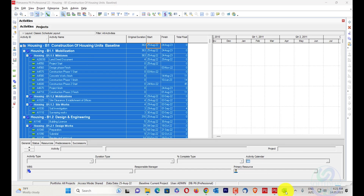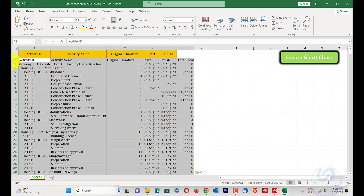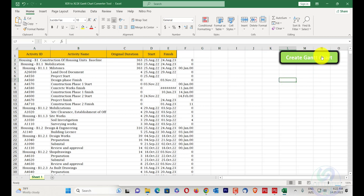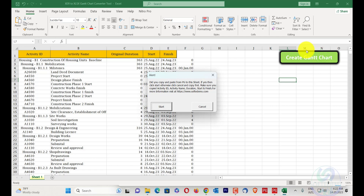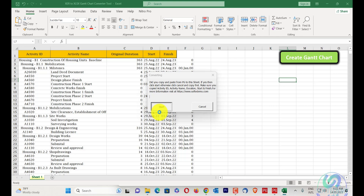I'll go to the tool and paste all the data here, then remove the first row. When I click 'Create Gantt Chart,' a notification appears: 'Did you copy and paste from P6 to this sheet? If yes, click Start; otherwise click Cancel and copy first. Make sure you copied activity ID, activity name, duration, start, and finish.' I'll click Start and the file will begin generating.